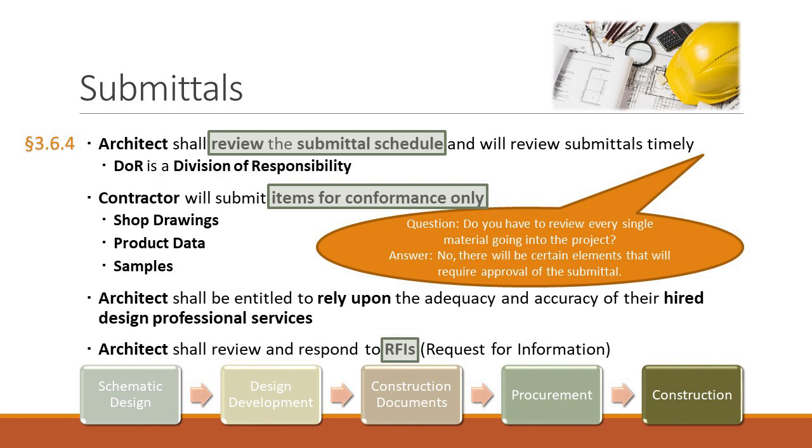If you said you needed a pump that needed to move X thousands of gallons per hour, and the contractor goes back and gives you a spec sheet on that pump and says, this is the product data of this pump, it says it should do that, that's all you need to do. You're not going to go in and look at the testing and everything else. You should be able to rely on those submittals as long as it's done timely. And so there's certain obligations. While the contractor's not designing, they are still satisfying your design requirements. Does that make sense?